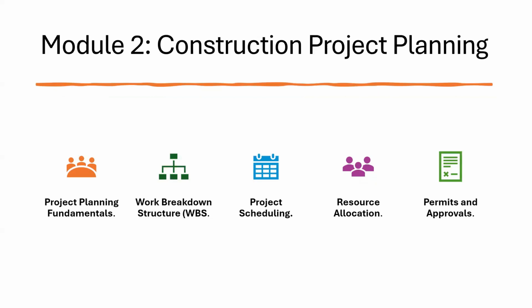And once you have a full understanding of the boundaries of the project, then you are able to break it down in a structured manner. Then you can do your scheduling, allocate resources, and get the permits and the necessary approvals which are necessary for your construction project. So you'll be able to look in depth at these areas of planning under the construction aspects.